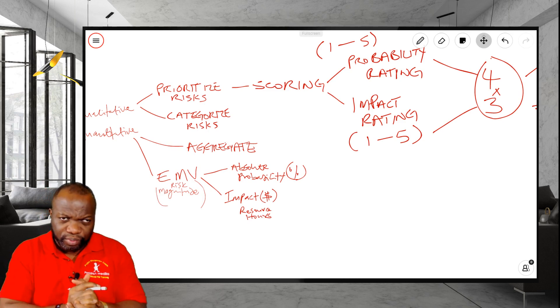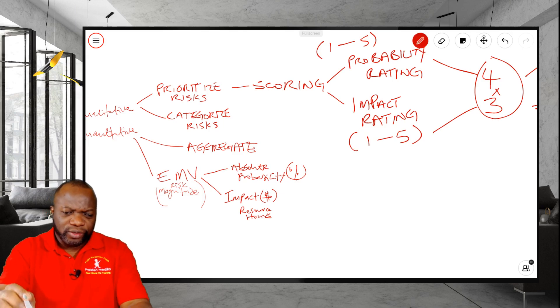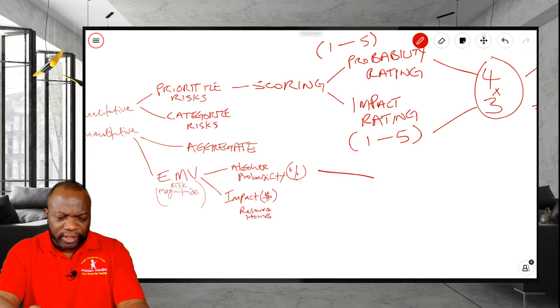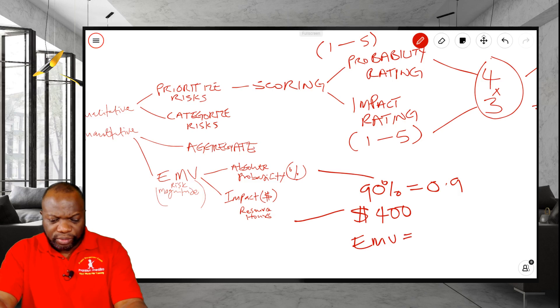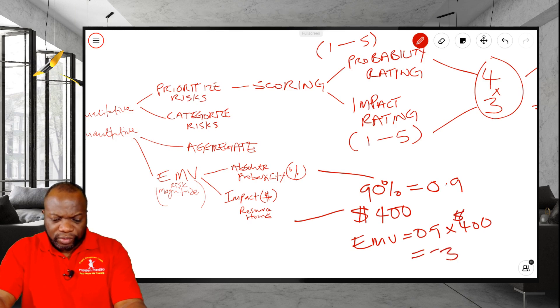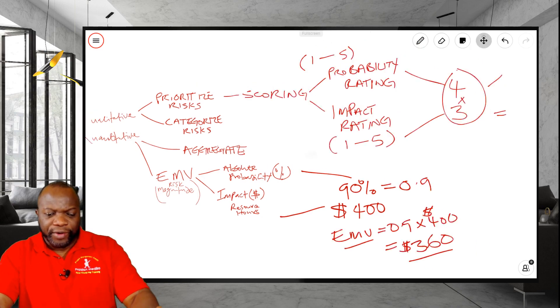So when you take a look at this, you're going to get your probability in percent, and let's say it's 90%. 90% is 0.9, right? The impact in dollars, let's say the impact in dollars is $400. Well, the EMV is going to be the product of both, probability times impact in dollars, and that will give you $360. And that will be your EMV, very different, as you can see, from a risk score.